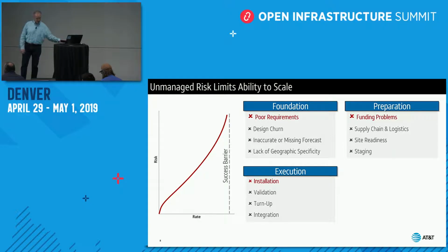And then turn up. After it's been installed, after it's been validated, can it be turned up and provisioned? And then finally, can it be integrated into the rest of the network? Do the people responsible for that know what to expect? Do you have your subnet, your addressing plan? Do you have your backup procedures? And it gets into really day 2 operations at that point.